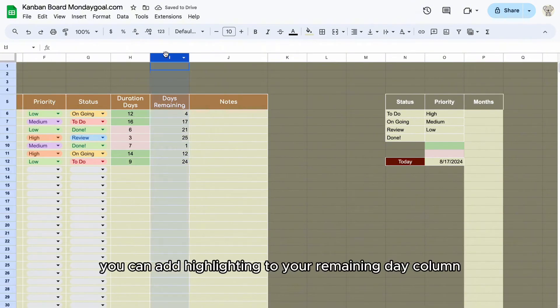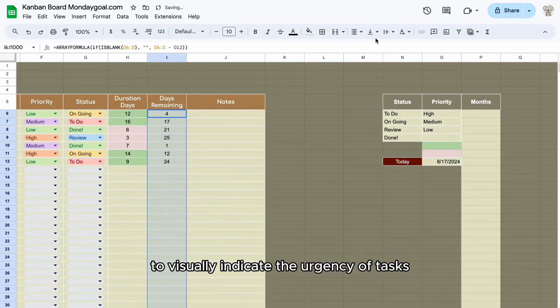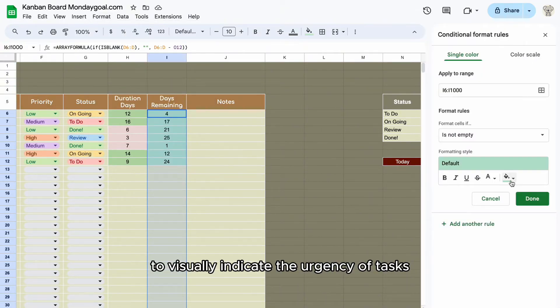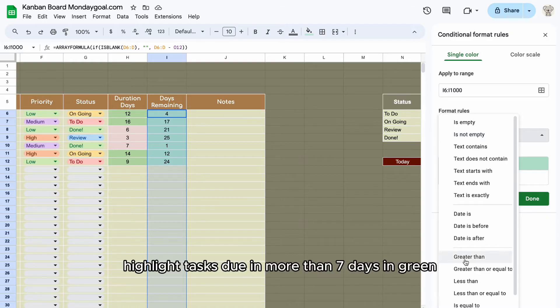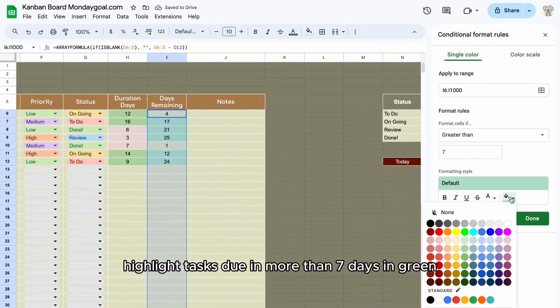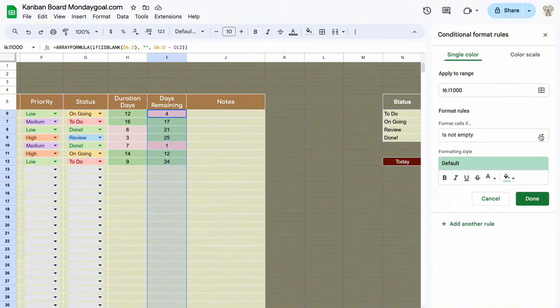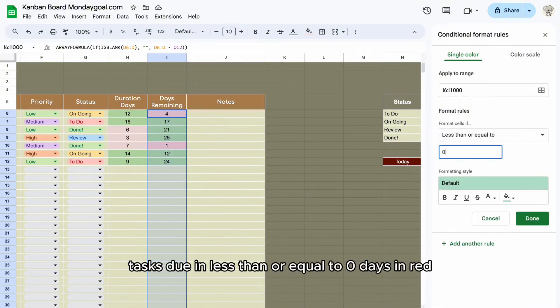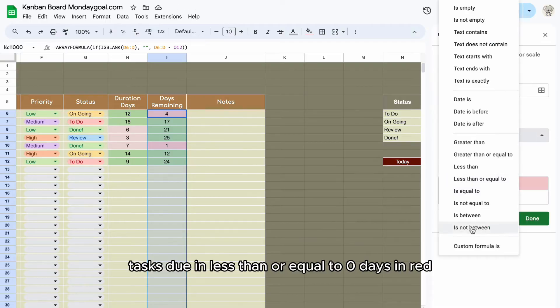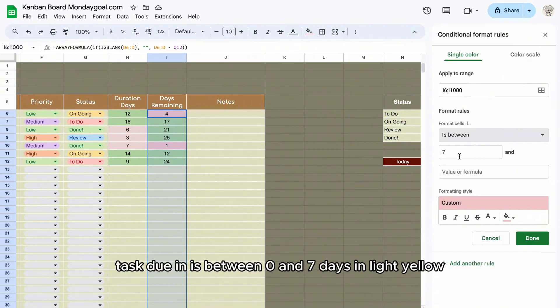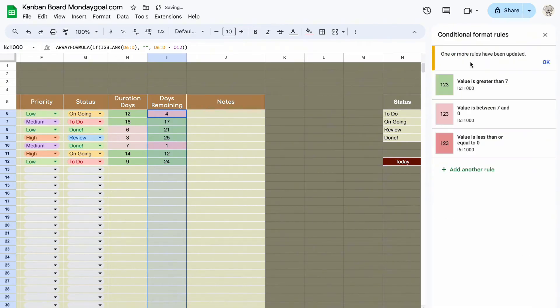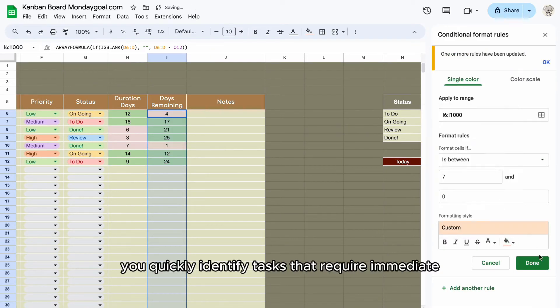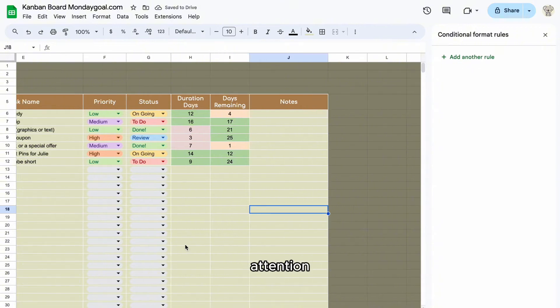You can add highlighting to your remaining day column to visually indicate the urgency of tasks. Highlight tasks due in more than seven days in green, tasks due in less than or equal to zero days in red, and tasks due between zero and seven days in light yellow. This will help you quickly identify tasks that require immediate attention.